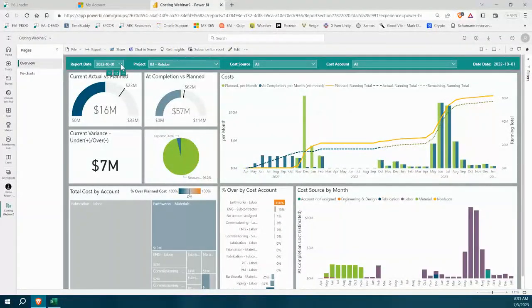So a snapshot in this case is a report date. So these are monthly. So every time I do an update, I've done my percent completes, I've validated my remainings, I take a snapshot. So some of you might do baselines, but the idea here is we're snapshotting it into a warehouse, our data warehouse, which is made simpler to work with for reporting. So it's denormalized and it's made much easier for reporting. And then you can get all sorts of great different dashboards out.